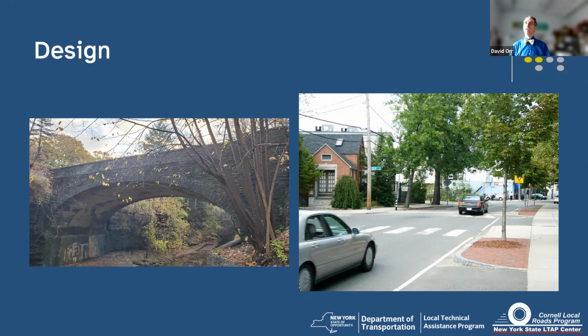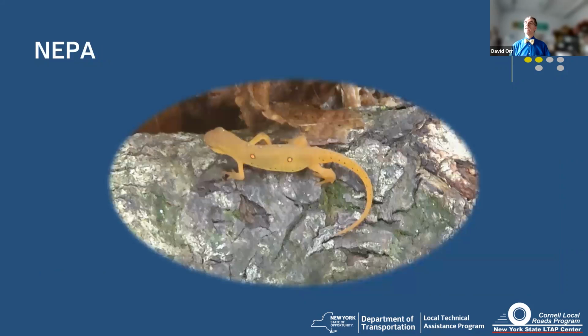The first one is one that we've already mentioned in our poll just a second ago, and that's the environmental issues. Okay, so NEPA. NEPA, if you don't know, stands for the National Environmental Policy Act, another acronym. Essentially, it means environmental. You've got to worry about endangered species. You might have to worry about issues of wetlands. This is where you really got to focus in, and this is one of those where you really want to get approval, not permission afterwards. So you really need it ahead of time. By the way, it just reminds us what we're really trying to do is protect the environment so that it's here for a long time for everybody. So you've got to do that during the design phase.